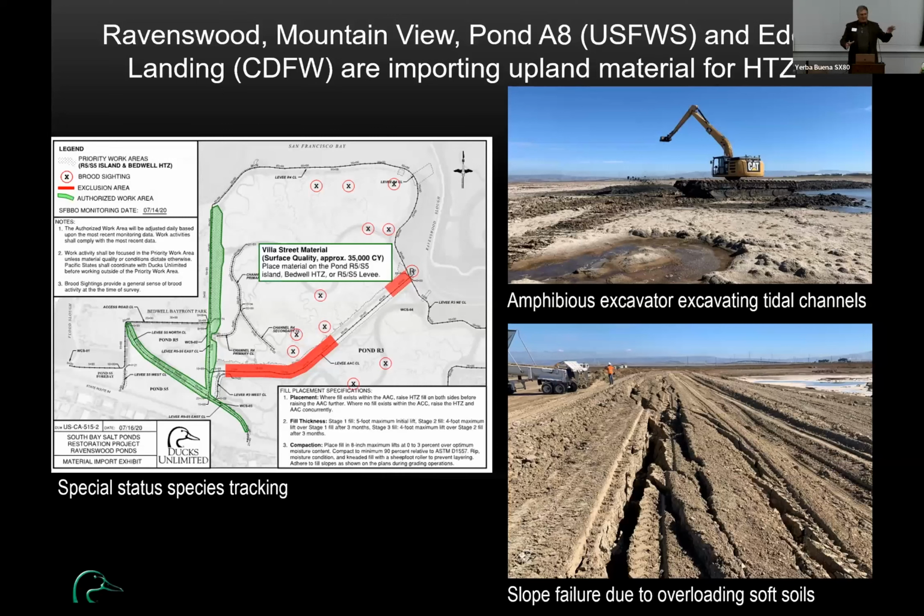It's a lot of material, but not a lot in the grand scheme of things. And we had material going to other sites because those contractors were being successful, but the one that had, you want to say, ownership of Ravenswood wasn't getting any material. So we just were sitting there with nothing to go, which was very frustrating. And then in 2022, we had a few issues where we had material that was ready to come in, but we didn't meet the whole QAP process timeline, so we lost it.